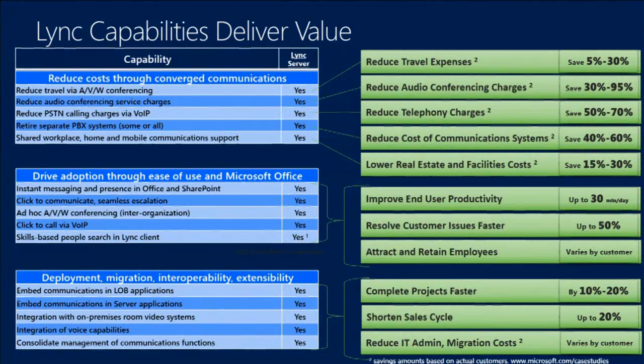We have seen a lot of projects where the audio conferencing providers they were using before introducing Link were actually so costly that just by replacing the audio conferencing, all the Link project, including services, including the servers, including licenses, was already paid off. If you are able to find these numbers in your company, you will have a very easy time to get budget for your project.